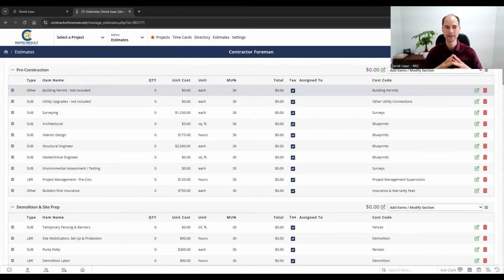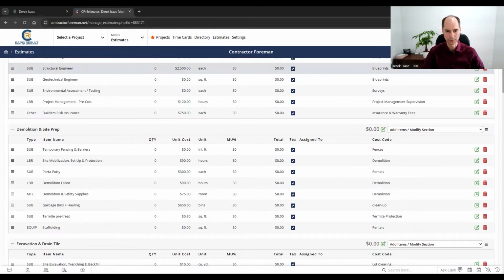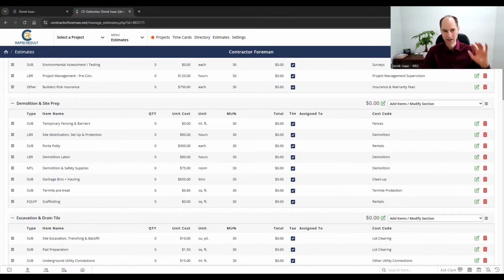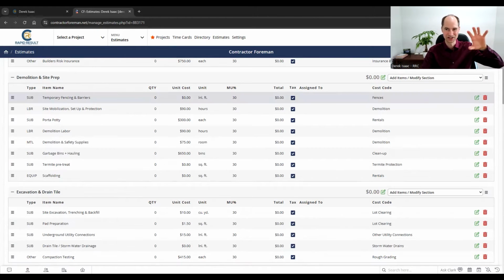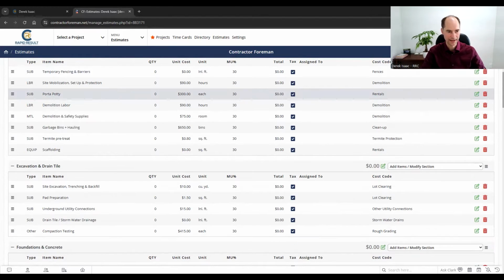You know that there's going to be some cost here. You're going to tell the client, hey, this could be anywhere from ten to $30,000 extra if you need additional upgrades, or permits could be anywhere from five to $15,000. We don't really know that. So things like that, they're aware of it, but you don't necessarily need to have a price in there. Again, you can do an allowance if you want, it depends on you, but it's nice to have the item and leave the price out, because it makes the whole project look smaller, even though you know that when you get to the finish line, there are going to be those additional costs. All right, so that's that.